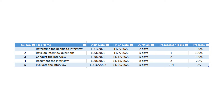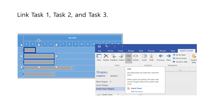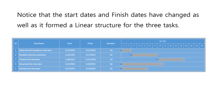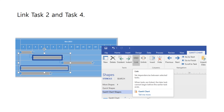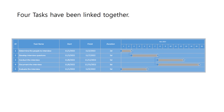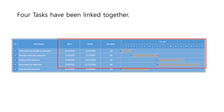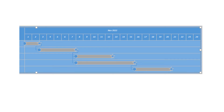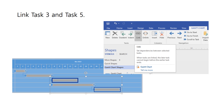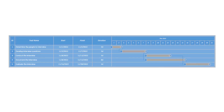Also, task number 5 must only start whenever tasks number 3 and 4 are both done. In this regard, we must link the tasks separately. First, select tasks 1, 2, and 3 and link them together. Notice that the start dates and finish dates have changed and it formed a linear structure for the three tasks. Then, since task 4 also starts when task 2 is finished, link them as well. Now tasks number 3 and 4 start at the same time. Next, link task 4 and task number 5. Finally, link task 3 and task number 5. Now our Gantt chart has been created.